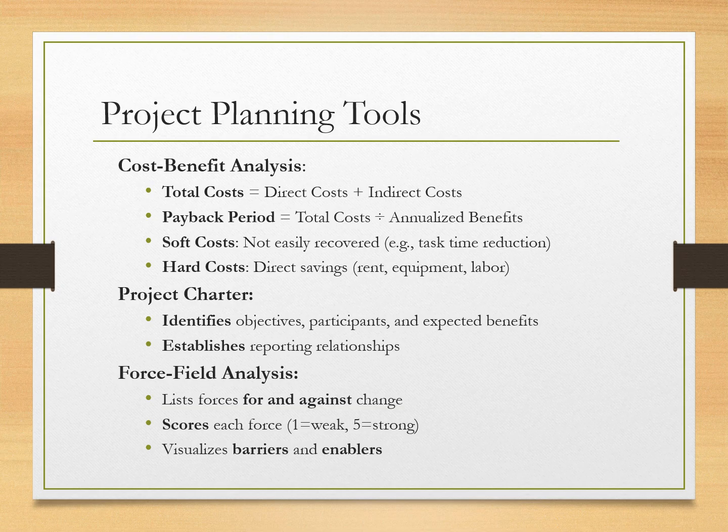Project charters are our project's foundational document. They identify objectives, participants, expected benefits, and the reporting relationships, which means who reports to whom and who has authority over what issues. Think of this as the contract that everyone needs to agree to upfront.